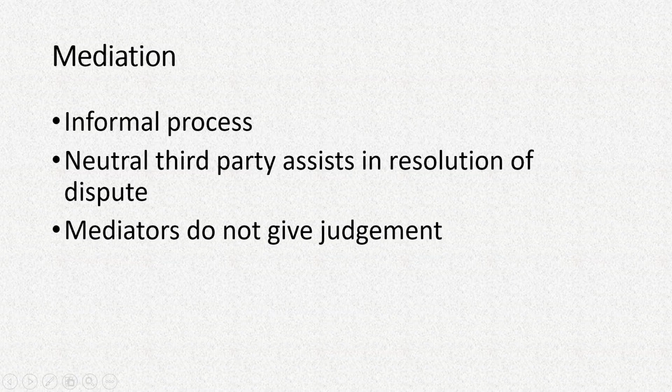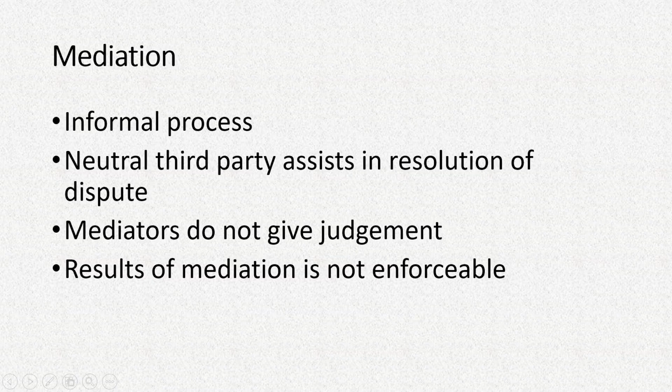That means the mediators do not give judgments, and the results of mediation are not enforceable. Whatever suggestion is given by the mediators, either party may not like it and they are not bound to follow it.